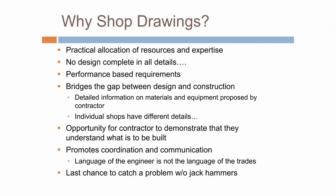The last point is really my favorite. Shop drawings are the last chance to catch a problem without a jackhammer. If you miss something on a shop drawing and place concrete with insufficient reinforcing steel, you're talking jackhammers. If you catch it on a shop drawing, you're talking about a couple of pencil marks to add some additional steel — and you do it without any problems out in the field.